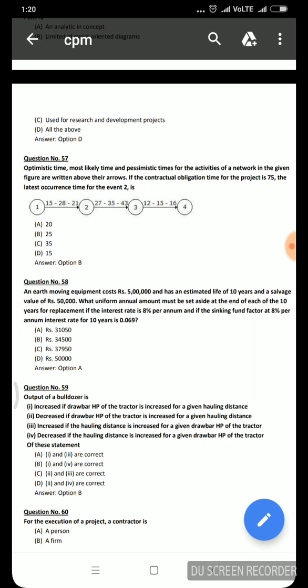Next question: an earth-moving equipment costs Rs. 5 lakh with an estimated life of 10 years and a salvage value of Rs. 50,000. The sinking fund factor at 8% per annum for 10 years is 0.069. Calculating the uniform annual amount to be set aside at the end of each year for replacement, the correct answer is Rs. 31,050.